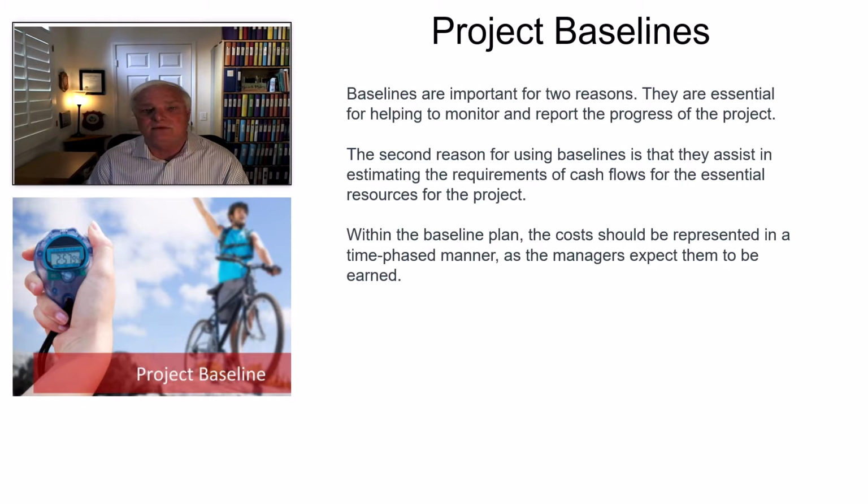Then what happens is you come back and you recheck that baseline. And the monitoring and measuring we do is based on where you were in the beginning from a baseline standpoint. And then the time phasing as you progress through a project causes you to look at things from a baseline's perspective. Where are we at this point in time as I'm monitoring and measuring compared to what my baseline said I should be at? Now, you can create a new baseline, but typically that means you have to have the customer's approval and all of the stakeholders have to accept it also.